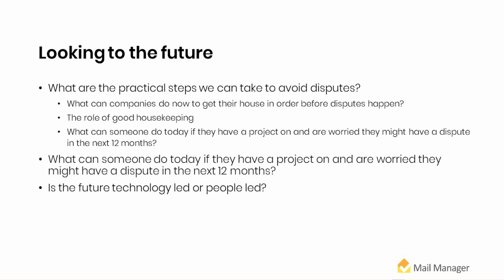Cool, awesome. All right, so yeah, the Building Safety Bill, a draft version of that has been released for public scrutiny at the moment, and it is closely linked to Dame Judith Hackitt's Building a Safer Future report, which was in response to the Grenfell disaster. In that report, Judith Hackitt mentions a really strong need for better information management, robust record keeping, and making sure that the right people have the right information to make better decisions. What is really interesting actually is, although the golden thread played a huge part in the Building a Safer Future report, it's actually not in the legislation itself at the moment.